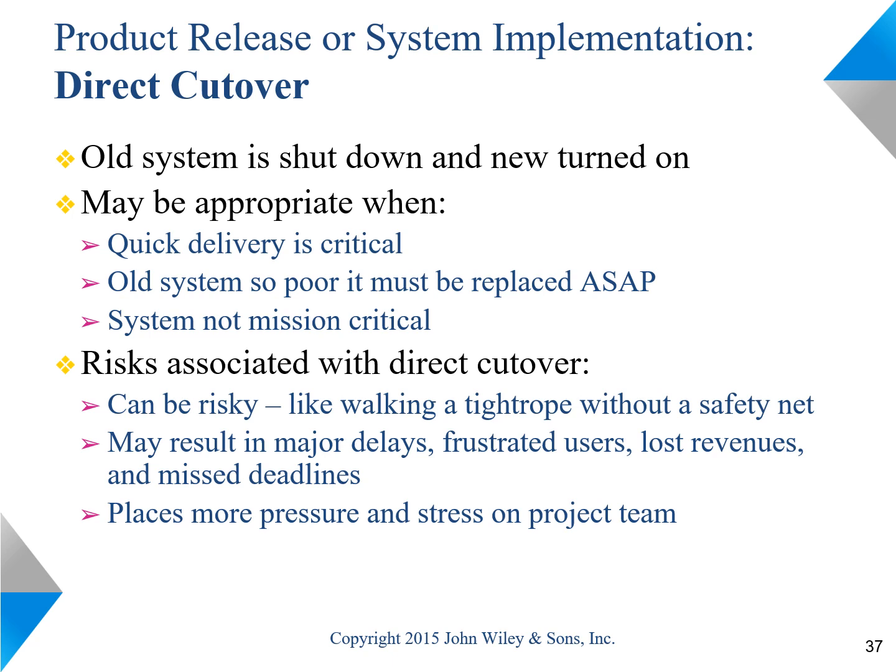So let's look at some of the pluses and minuses of each approach, like a direct cutover. It may be appropriate when we need a quick delivery and we want to implement the new system very quickly. Especially may be appropriate if the old system is too old.